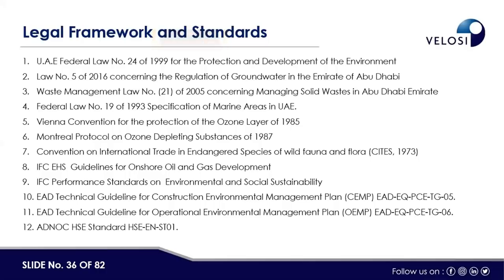Yes, normally a waste management plan is not required by the regulatory authority. It is only an internal requirement or the client's requirement. In the CMP, we are covering the waste management. So if it is only related to the regulatory authority, then there is no need to develop a separate waste management plan. But yes, if it is a client's requirement, that might require you to submit or develop a separate waste management plan, which will be based on the waste management procedures developed in the CMP.